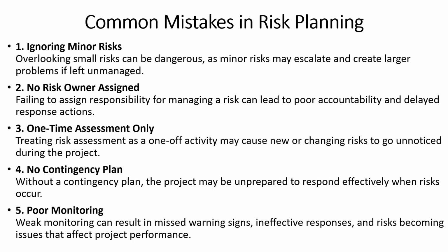The second mistake is not assigning a risk owner. If nobody is clearly responsible for managing a risk, accountability becomes weak and response actions may be delayed. Every significant risk should have someone responsible for monitoring and managing it.